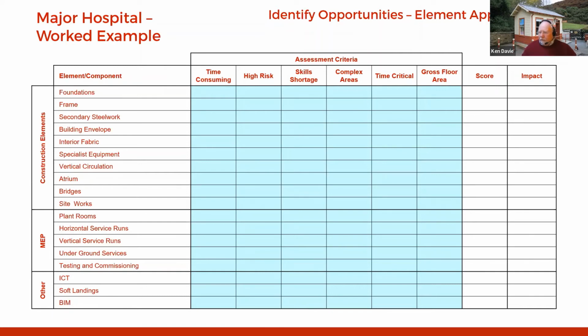So what we did here is we looked at, down the left, the elements and components, and then just picked some assessment criteria, keeping it relatively straightforward. And the approach is yes, no. So foundations time consuming, yes, no. 1 is yes, 0 is no. And apply that across the entire